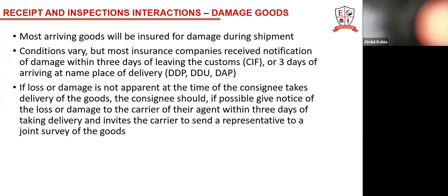So these are some of the Incoterms, the DDP, DAP, or those 3-letter words mostly used in the contract to tell you who is going to take responsibility. In Incoterms, they will say once the items leave the manufacturing place, it's the responsibility of the buyer, or they will tell you the responsibility of the manufacturer or the supplier right to the central medical store. So all this needs to be specified in the contract document.